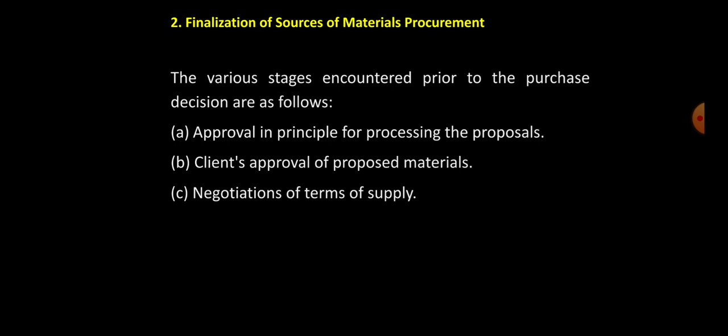So basically in this particular stage, the quotations are called, a comparison sheet is prepared, and we study the financial implications. Also, we check the profitability if some major deviations are to be carried out, and all the things have to be approved from the client. Before we have the final negotiations, we finalize the rates with the vendors, etc. The negotiations are to be carried out, and we have to have an in-principle approval from the client.